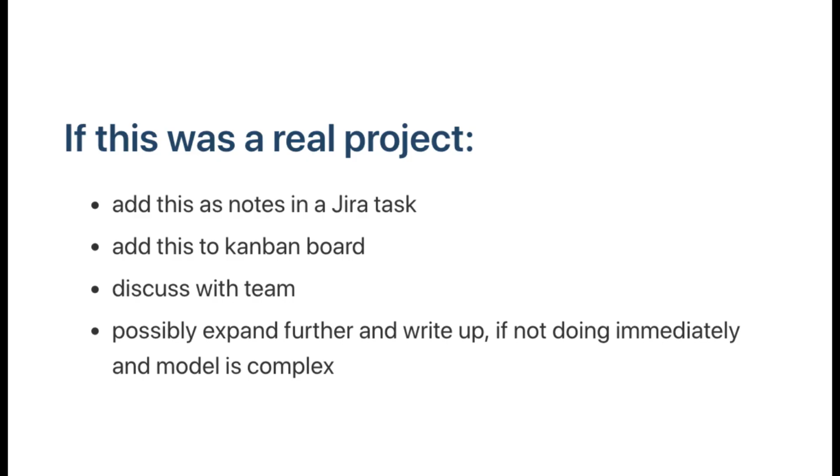A lot of our planning is related to how quickly we're going to implement that plan. How detailed do we plan? It's how quickly we're going to do it. If we're not going to do it immediately and we think we're going to forget, but it's important, we've got live ideas, we may go into more depth as a plan now. But if we're going to do it immediately, we may plan on the fly. So it depends how exploratory our project is going to be.